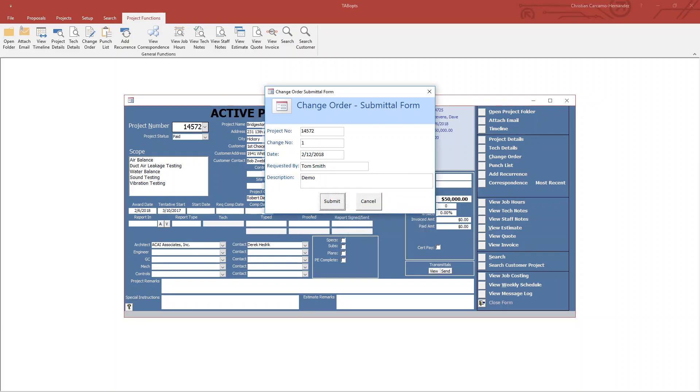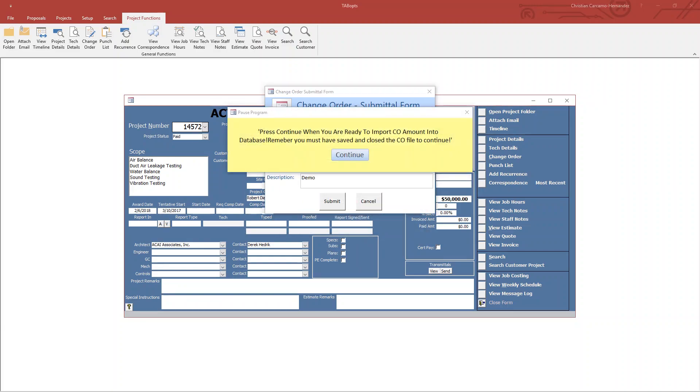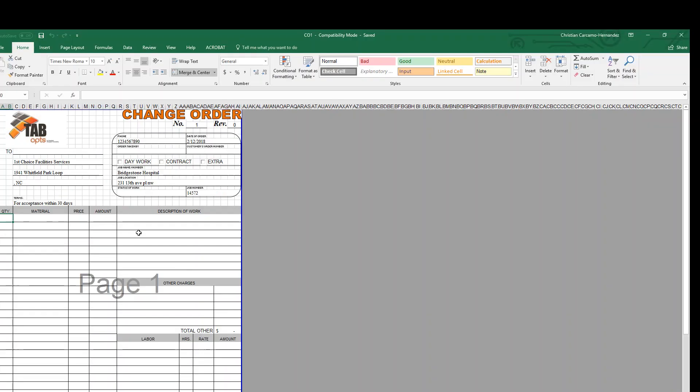It opens up an Excel document here. With this you can simply select your quantity, add material, description of work, or labor.